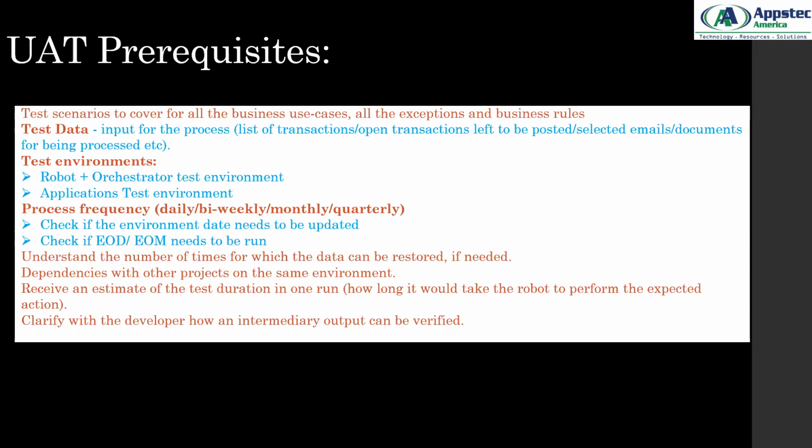In the testing phase, we do not touch the production, but we had to wait for the entire 4 weeks for the data to come in, because we wanted to test it on real-time data rather than any dummy data. For some applications, processes depend on financial information, right? You are not allowed to create any dummy information. So you have to take some authentic business data and run it in the test environment so that it does not impact the production. There are a lot of process-related and organization-related things which are a challenge. Based on that, your planning needs to be there, right?